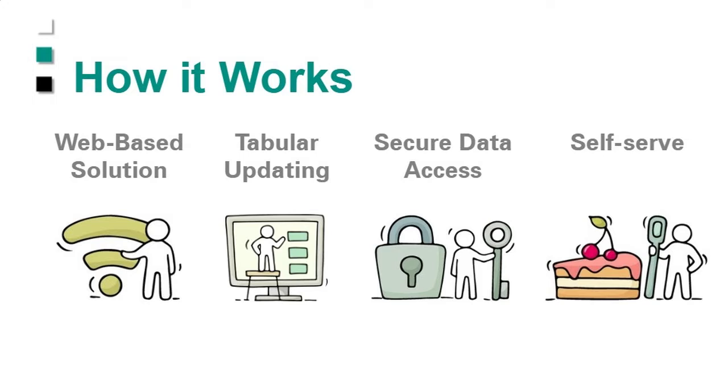So the user list and the data available to that user is all controlled up in P6. If you only want them to be able to see dates and activities, no resources, no expenses, you just put that in the security model in P6. And then CAPPS will adhere to that security model. So that's the way that we've built that.